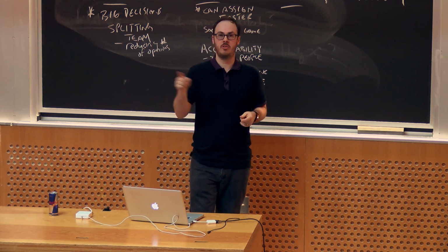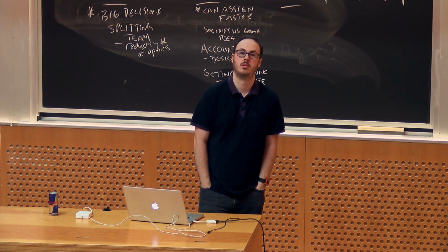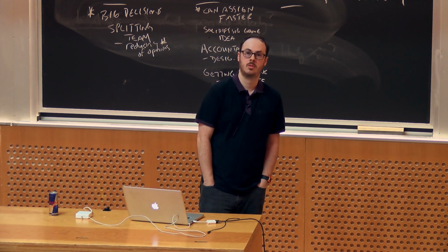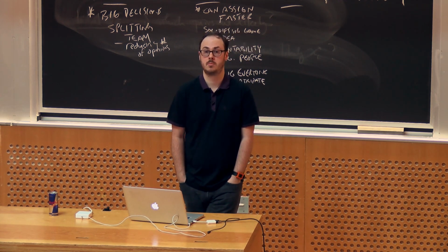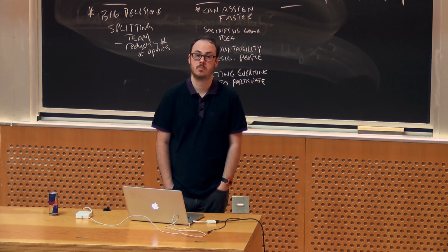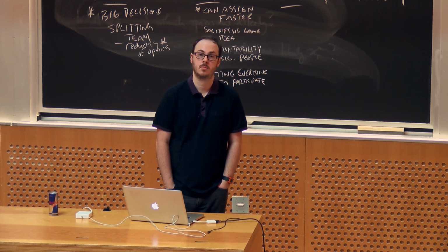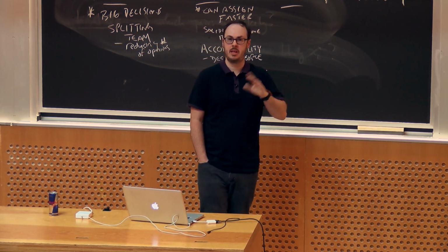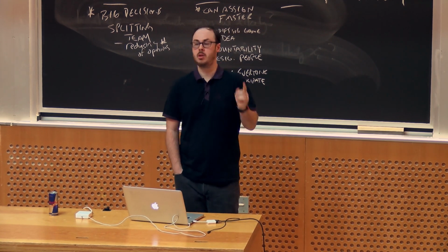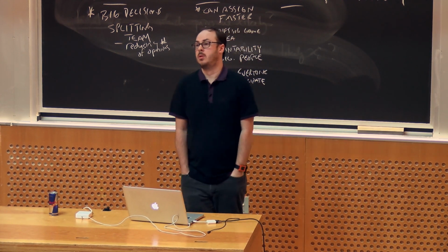Okay. So where does, yeah, go ahead. Yeah, and I think also it depends if everyone on the team is willing to take ownership versus only some people, because that'll create a different dynamic. Absolutely. Some people are willing to take initiative, but the others aren't. Then you're still going to need to assign some tasks. So something that's kind of worked is at the beginning, people take ownership, and then for the tasks that are left, there's one person who delegates them out. Okay. So at the beginning, everybody takes on tasks, and at the end, the leftovers get assigned.